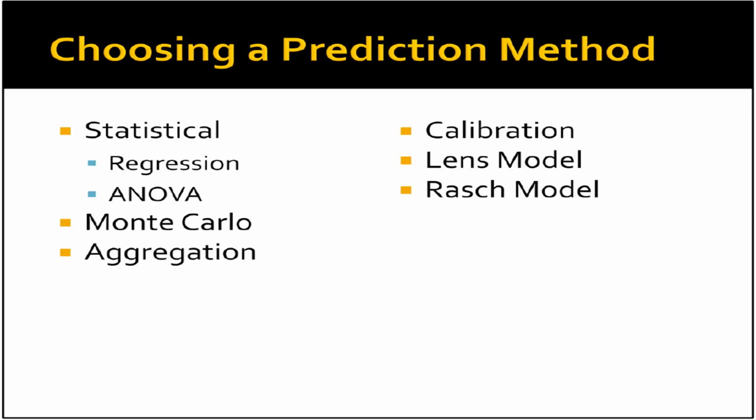It can help you determine if a detectable change is statistically significant or not. Once you have some initial results collected from your tracking, you can use a Monte Carlo simulation to help you predict longer-term impacts. Remember, with any of these types of prediction methods, more data gives you more accurate prediction. Thus, having at least some of the initial results can help you to increase your accuracy with longer-term predictions.